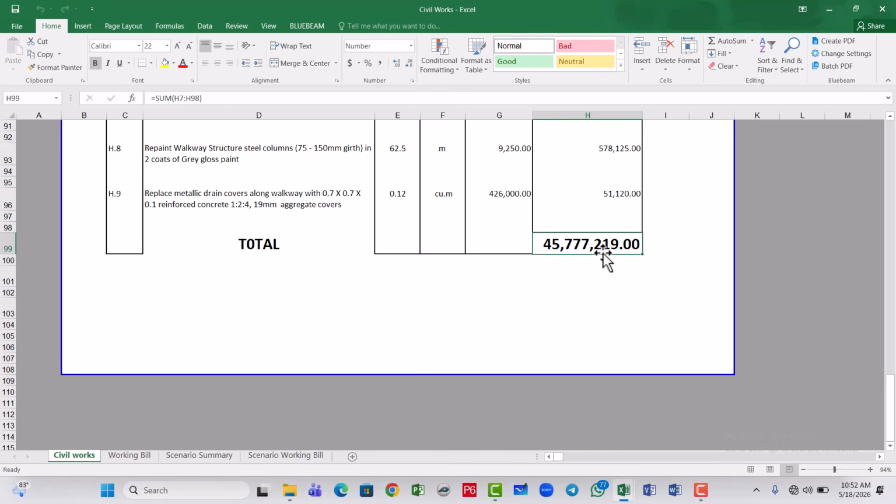So now you will understand that in most cases, especially when there's a relationship already existing between the client and the contractor, there will always be some kind of negotiation. And if such negotiation comes in, there's a possibility that there's going to be a reduction in this price, right? Now, let's say after a bit of negotiation, there's a 20% deduction from this contract sum. What it means is that 80% of this contract sum is what is left for the execution of the project.